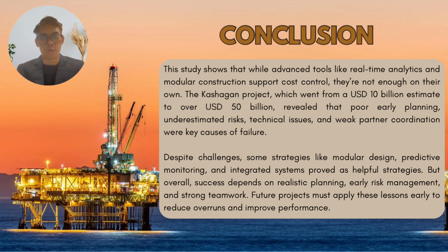So, in the conclusion, from our case study on the Kashagan oil field, we've learned that even with advanced tools like real-time monitoring and modular construction, cost management can still fail if there is poor planning and weak coordination. The project went way over budget, from 10 million USD to more than 15 million. That was mainly because of early planning mistakes, technical challenges, and lack of strong teamwork.